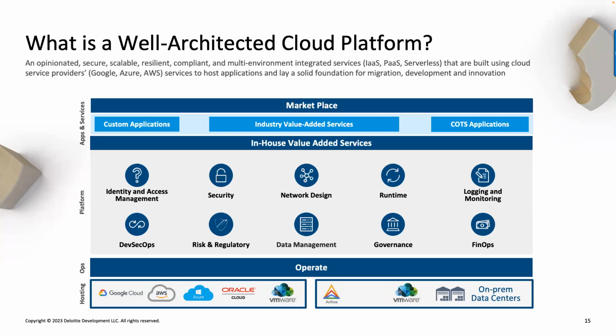And if you want to peel the layers down, you look at the bottom, that's where your Google Cloud or Amazon or AWS or Oracle, whatever, they give you these Lego blocks. That's what they give you. It's your job to take these Lego blocks and build something out of them. And every time you build something out of them, they are certified, let's say HIPAA or FedRAMP moderate. Anything you build on top of that, you have to go and certify. It's not enough that they are HIPAA certified or FedRAMP certified. If you built an application that has to be compliant with whatever practices, you have to take that application through that certification process. So therefore, it's not a trivial task to take these Lego blocks and build the platform.